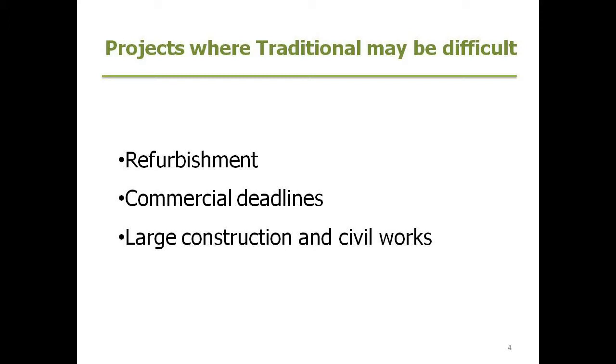Now let's consider projects where traditional forms of contract delivery might be difficult, and these really apply where there's commercial opportunities or a lot of disruption involved in the project on a large scale. These might be large tunnels, major infrastructure projects, and I say commercial where you might have a number of retail outlets wanting to open at a certain time, or maybe a large retail mall that needs to be open and operating at a specific time.